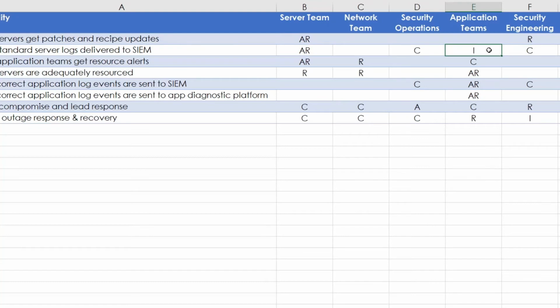I remember when assigning I's, we usually assign them to, for example, leadership teams and things like that, where they want to get updated on how things are running, sure, but they don't usually decide a lot of things, and they usually don't have a stake in it. If it was a steering committee, on the other hand, that's a different thing, right? That would be a consultant.